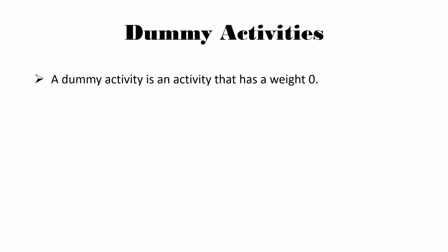These are called dummy activities. A dummy activity is an activity that's not real, so it has a weight of 0. They're not given letters because they're not real activities.